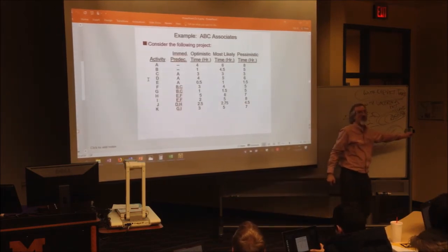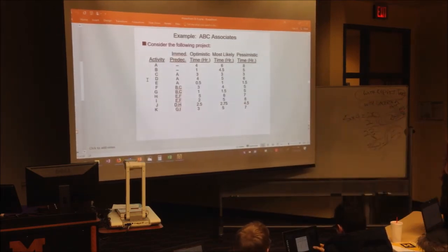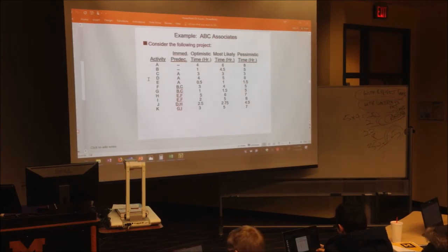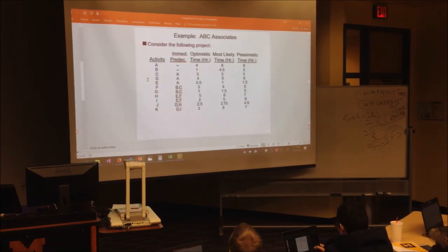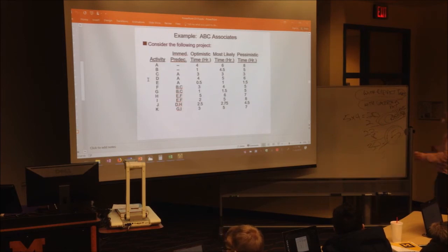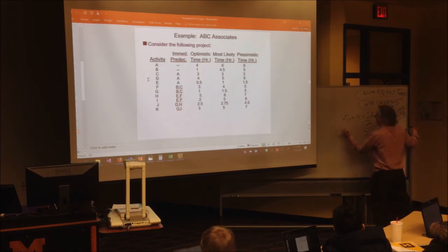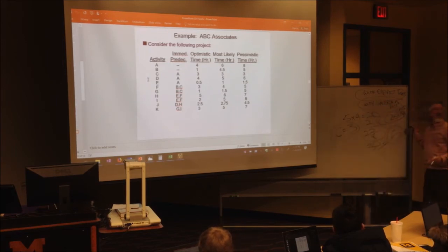Want to do one more? Yep. Here we go. Hang on, let me look. If possible, just tell me C. I don't have to do any math on C. What will be the calculation for C if I did all that? 3 times 4 plus... You don't have to do the math. Look at the times. What's the most likely time? 3. What's the pessimistic time? 3. What's the optimistic time? 3. So obviously C is 3.